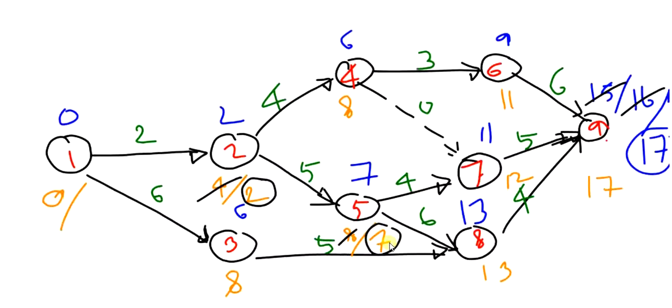It will be 8 minus 6, that is 2. But for TL value, we will be considering the lowest one, the smaller value. Therefore, we will cut this, and the final value is 0. Okay, the TL value of event number 1 is 0.